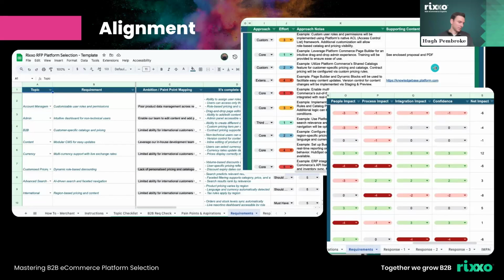I think, Chris, if I can just jump in here, I think what's really good about this template is that when we talk about its complete when and getting that acceptance criteria within the template and within the framework, this really then will enable you to get accurate answers back from vendors and agencies when it comes to approach and effort. As sometimes a requirement statement can be quite broad and has assumptions within it. But I suppose by adding in that when it's complete information, you get some real quality in terms of your data accuracy, and you can be comfortable that there's no assumptions within that approach and effort that they've given to you, thus giving you better data to present back to internal teams when it comes to budget and so forth.